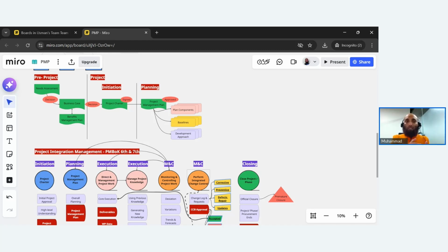So you perform needs assessment, where you analyze whether this project really is a need, and whether the need for which we are taking this initiative is really adding value. Once we have that needs assessment, it feeds into our business case and benefits management plan creation, which talks about it in more detail, taking inputs from the needs assessment.